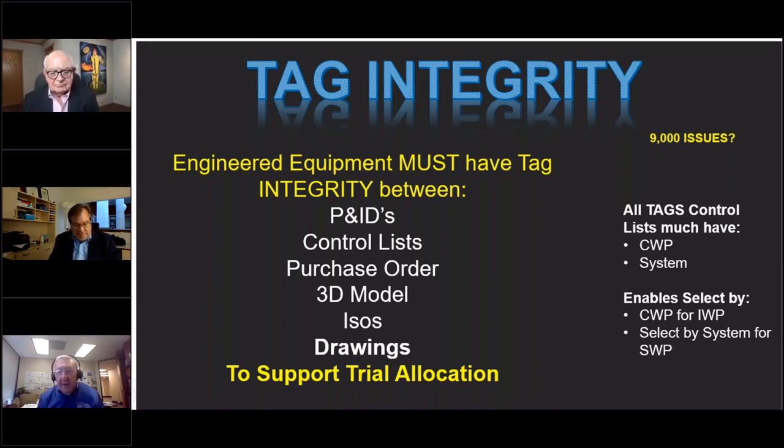But in reality, we really design by system. So we take a major system, and after that second or third model review, we end up having a bunch of model reviews, usually by system, as required. And we review each system in detail online with visible field welds. We have construction in there. We have operations in there. We have maintenance in there.